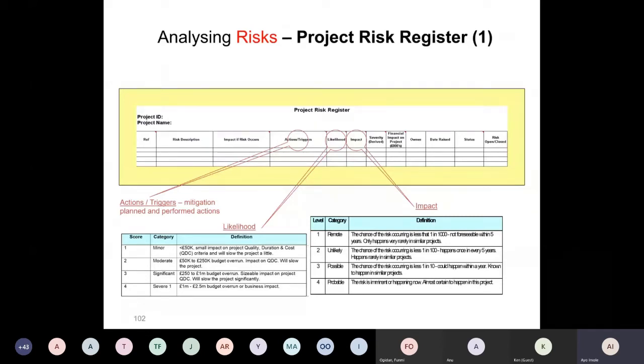So I need to go and meet the project manager. Okay, this risk you mentioned in the meeting earlier on. I'm now setting up a 10-minute or 30-minute meeting to say, you know what, these are a few risks we mentioned in the meeting earlier today. Can we actually explain what this risk is and put some meat or flesh into this? So the project manager is telling you, okay, it's going to get delayed by 7 days and all of that. What's the likelihood of it happening? The likelihood of it happening is medium. So you're documenting all of these with the help of the project manager. So that is what you have when we talk about a risk register.